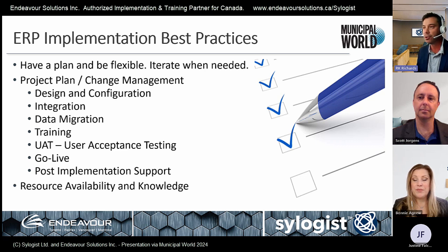So as you're going through the planning stage of the implementation, have your staff start recording their weekly, monthly, daily tasks so that when it comes time to test the software, they have a nice list of things that they should be testing and confirming that they know how to do.